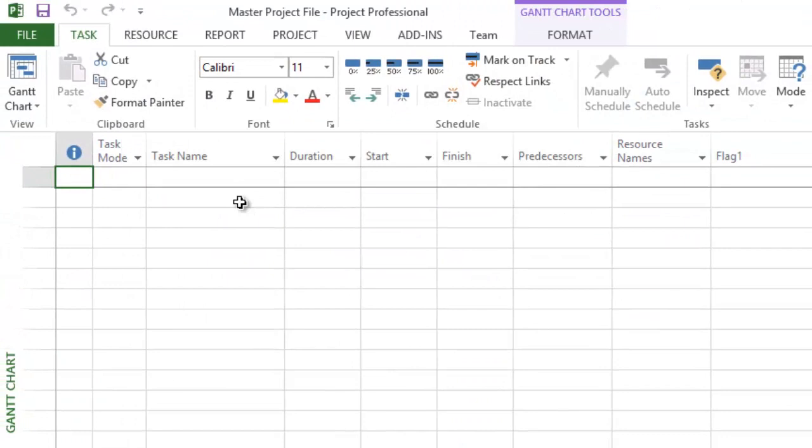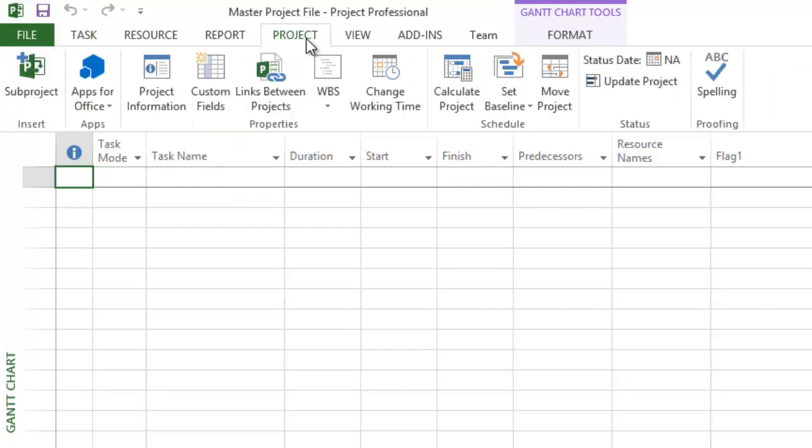Second, link your new Microsoft Project file to your existing individual projects. In Project 2010 or later, you do this by clicking on the Project tab, then on the Subproject button.